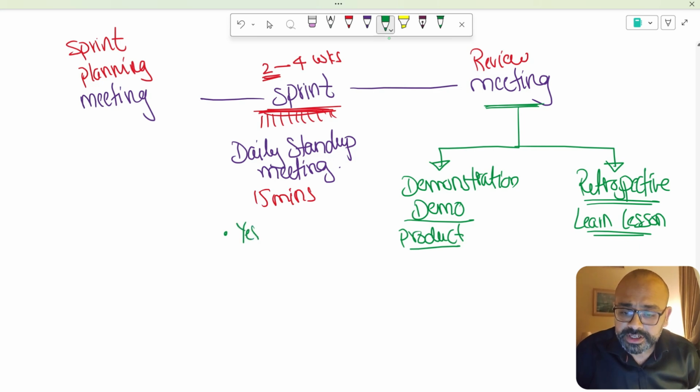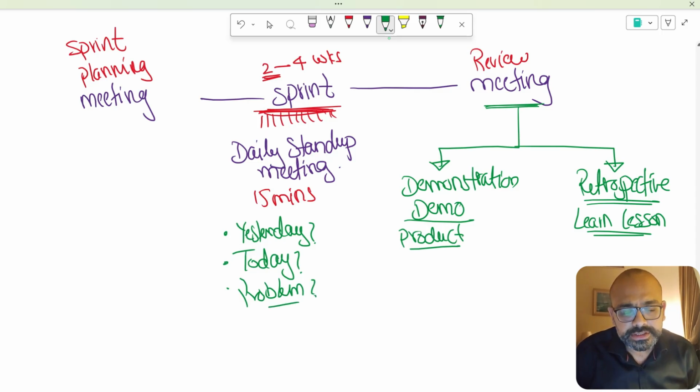What you have done yesterday, what are you going to do today, and is there any problem that you are facing? Just to highlight and raise the issue. That's a daily stand-up meeting. So keep that in mind. A very important meeting for the exam point of view.